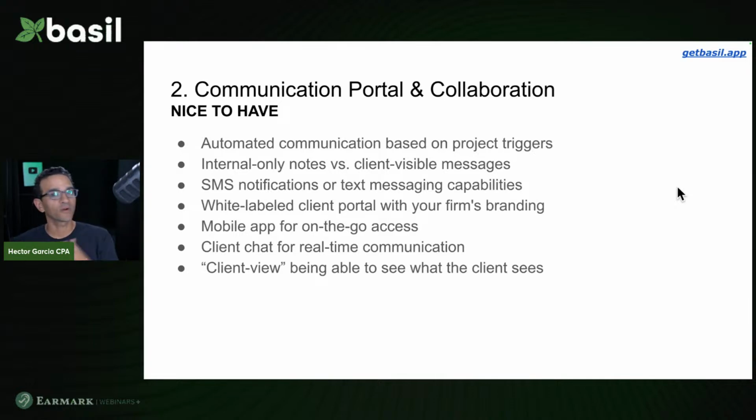So when you design a workflow like that, however the workflow looks like, sometimes you can schedule triggers in between these tasks to automatically notify the customer. This is nice to have because not a lot of practice management software have that, but it will be really cool that as the employee is moving it down the list, the client's getting notification, okay, we're in this phase, we're in this phase, we're in this phase, because it will significantly reduce the amount of times that the customer calls you and emails you and asks you, what's the status on my tax return? What's the status on my monthly closing? That sort of thing.